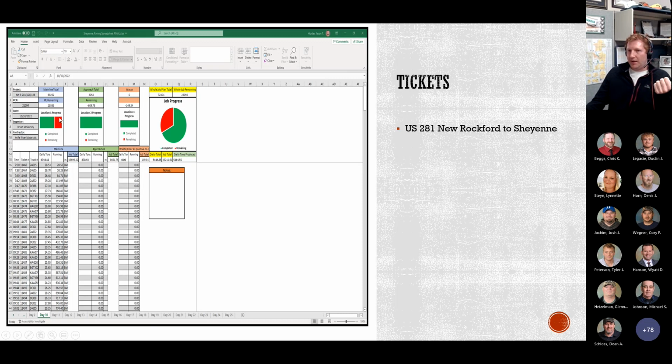Also with that, we have everything broken down into columns. So you've got your main line, you've got your approaches, and then the third column right now is utilized as a waste column. Generally we have a ticket taker on main line filling this out, as well as someone on approaches taking tickets, and they're filling this out all at the same time. You're all in the same sheet, and you can watch as people are both inputting data at the same time, which works very slick.